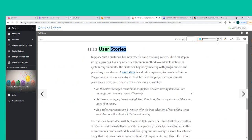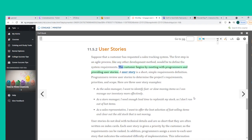Suppose that a customer has requested a sales tracking system. The first step in an Agile process, like any other development method, is to define the system requirements. The customer begins by meeting with programmers and providing user stories. A user story is a short, simple requirements definition. Programmers review user stories to determine the project's requirements, priorities, and scope.